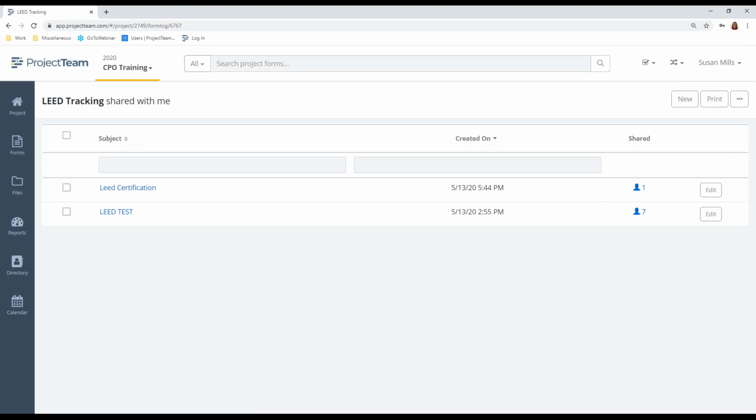and this is utilized by the party responsible for managing and obtaining LEED certification on the project. This form should be maintained with current LEED certification plan information as well as the progress information as applicable. Final LEED certification information should be captured in the form when the certification is obtained. Generally, one LEED tracking form should be created and maintained for each LEED eligible project as long as the plan does not change. Tracking information should be captured via editing the existing form. A new tracking form should be created and maintained only if the certification plan changes.